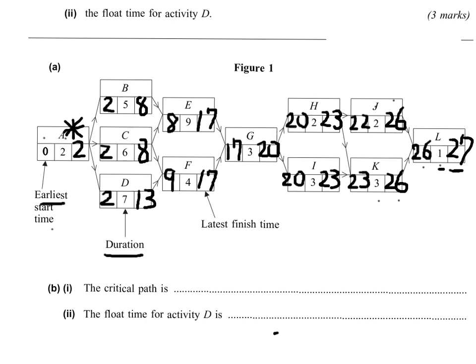No idle time in the middle. B starts on day 2, takes 5 days. So 2 plus 5 is 7. But B doesn't really have to finish until day 8, so it's got one day of idle time or float time. So B is not a critical activity.